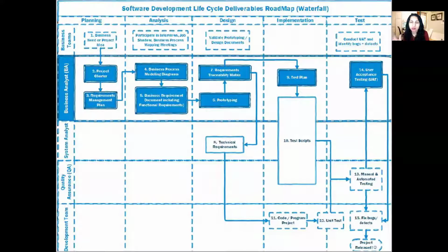This is why in the waterfall scenario, our projects take anywhere from 16 to 18 months, because all of this stuff is done ahead of time. You need to do lots of this documentation, at least up to design, before coding can start. And that's why projects in the waterfall scenario take a very, very long time.